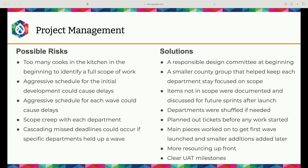So we were able to work with the project management teams at the county levels, as well as the sponsors at the county level, to ensure that, for example, if we realized one department was going to take a little longer than we thought, we could substitute it out with another one in that wave concept that we were talking about. So we're not pushing any waves out. We're able to replace departments with others during that initial smaller discovery session and utilize a lot of what we did in the initial discovery to help push things forward for each subsequent wave.